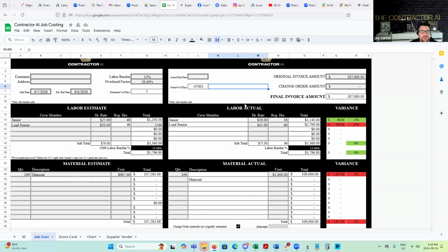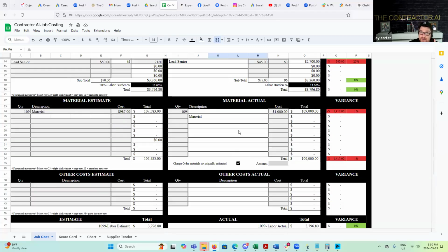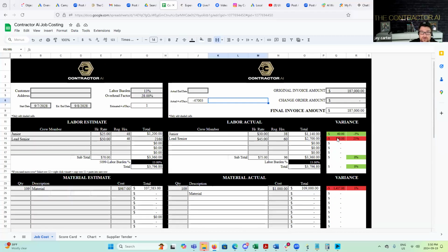Your overhead, everything else, that stuff doesn't stop accumulating. There are not more days in the month just because you have a change work order, is there? No. You've got less. And now you've got to change your schedules and do all of these other things. You need to get paid. The minimum in the rule, nothing less than 50%. So you do the same thing, and you mark that bad boy up 50%.